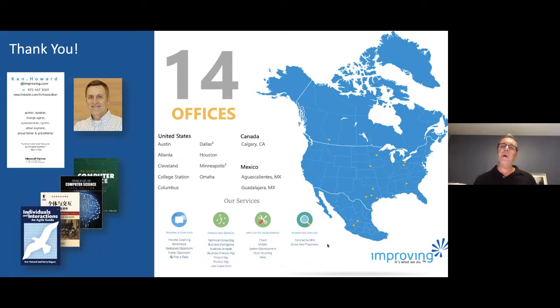If I put something up on the backlog and I gave it a 5, and then after I work on these other items, I determine, whoa, that was bigger than a 5. It should have been a 20. Change it from a 5 to a 20 so that your forecasts can be an accurate reflection of the current state of the backlog. Now, that may cause an impact to your schedule or your budget, but you want to know that early on so you can make business decisions on what do we do about that. Do we pull something out of the scope? Do we extend the schedule, extend the budget, try to increase our velocity in some ways? So at least the options are available to us if they do reflect reality on the backlog.